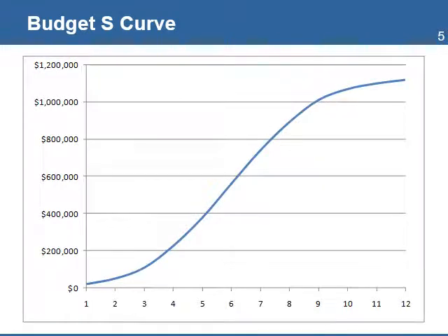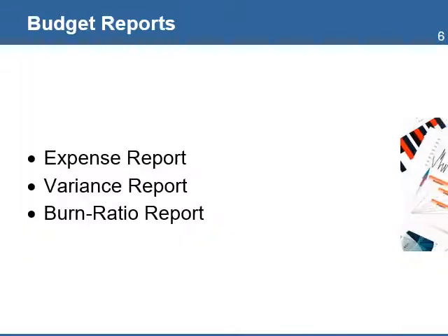The ideal approach is to use a baseline that closely approximates an S-curve to reduce the variances in cash flow. As you can see from the graph, the budget plan expenses follow the level of effort in the project. In the first months, the level of expenses is usually low, but increases during the implementation and then lowers at the closing phase. This is a better approach to monitor and control the project budget.